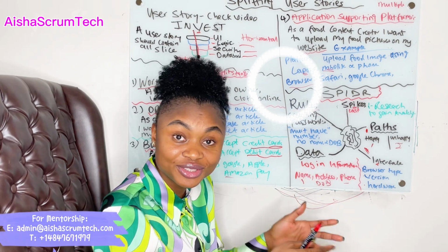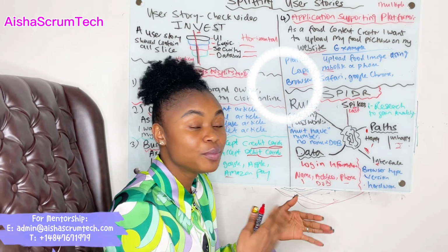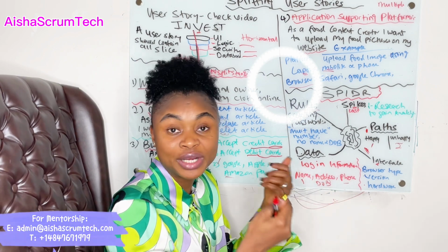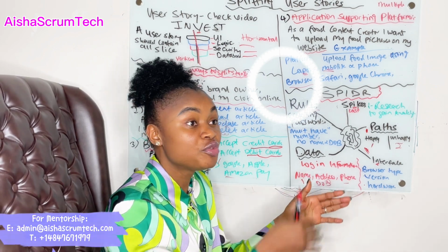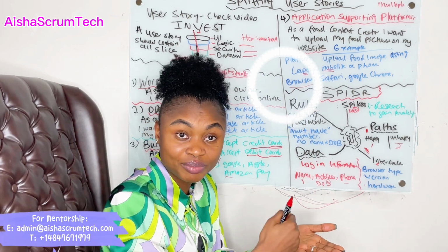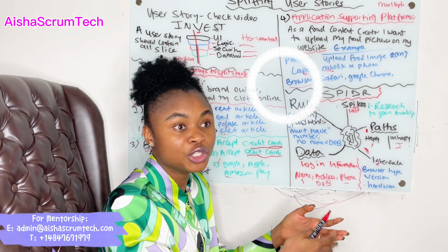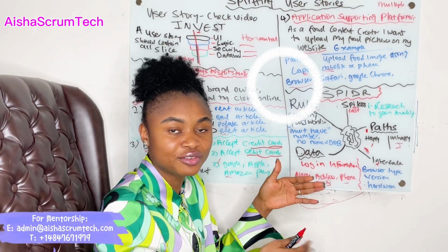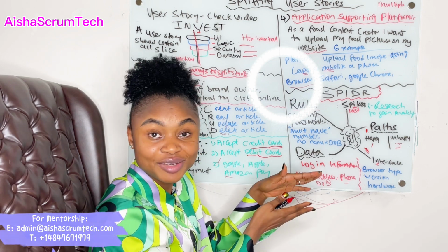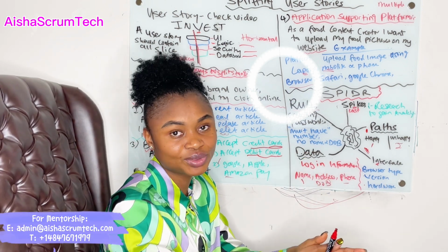And when you do those, it's going to give you an error message. If you are able to come up with your password, you successfully create the account and log in. But if you fail these rules that are set up in place, you are unable to log in to that account and get an error message. So you can also use rules to split a user story to ensure that you focus on happy login for people in this sprint. Maybe the next one can be the error message.